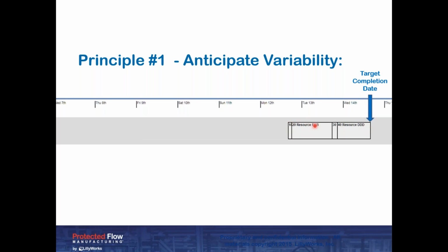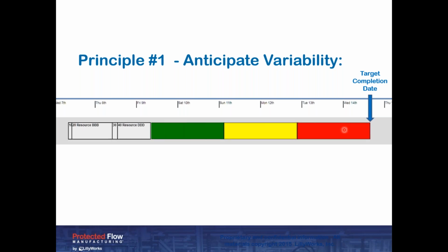So I know there's going to be contention between other jobs, between operations. There might be stuff going on during operations. So I need some time protection here. I need a buffer to protect my due date, right? So what happens is when this information comes in from your ERP in real time, we create what's called a custom execution plan specific to every job, okay? The due date is the anchor point for it. We back off the buffer, and this is also dynamically assigned and sized based upon certain values or parameters, okay?